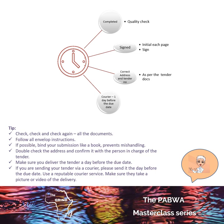Please make sure you can deliver your tender document either first thing in the morning on the closing date or the day before. If you are using a courier service, make sure they go a day before. Make sure they take an actual video or photograph of the submission as part of your arrangement with them, because I find that they hand in your document at reception and it just sits there. It must be very clear with your courier service that they are to take a picture or video of them putting your document into the tender box and submit that as evidence to you.